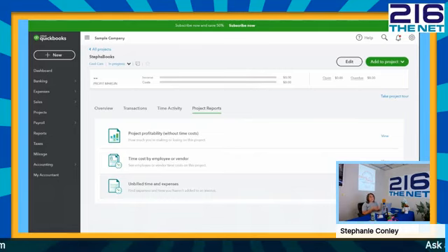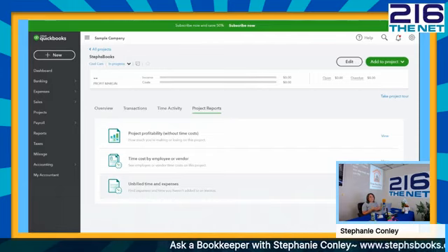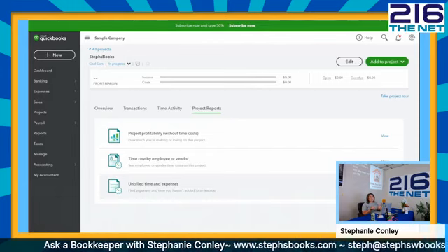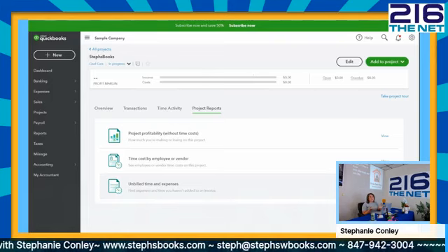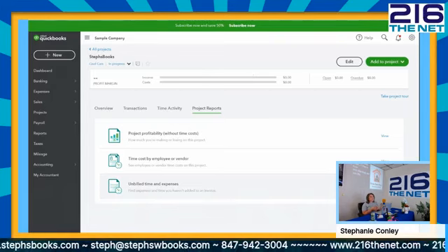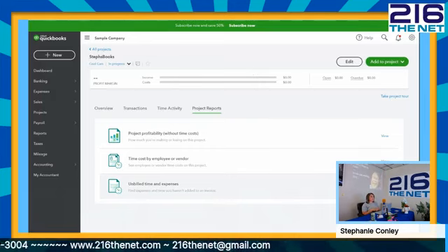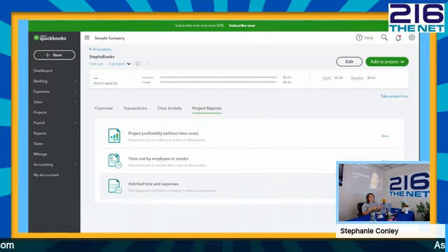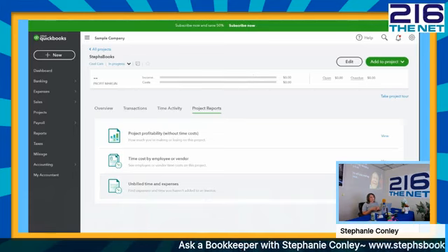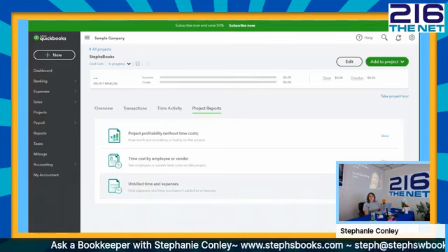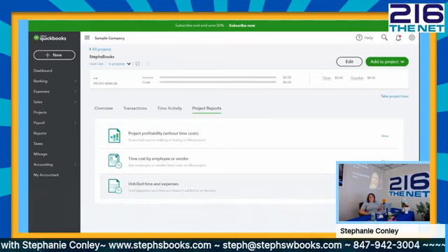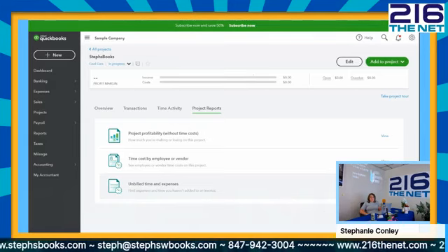So let's say your profit is showing $10,000, but your overhead costs are, whatever, 25 or 10%. So you would need to deduct an additional $100 to get that true $9,000 profit. Or if your overhead is really high, then that will obviously show you only had like a 1 or 2% profit on that job. So you'd use this really, like you said, as a running P&L for a project.